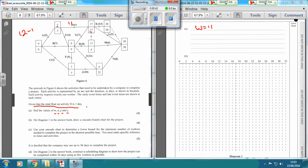Let's find X. X is the earliest time at which we could start N. If we look here, 3 plus 10 is going to be 13. But we've also got another path coming into it - this one can start at 9, and if it's going to take 12 days, 9 plus 12 is 21. So the minimum that this one can start is 21. So X equals 21.